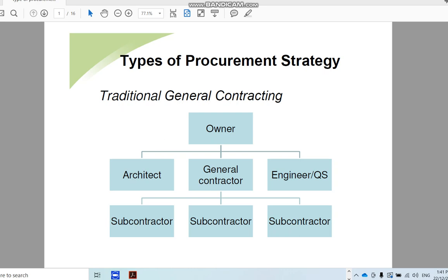So in the requirement cycle, the owners, engineers, or separate consulting engineers or the architects or professionals prepare the concept, characteristics, and nature, the environment that this project will be carried out in. Then you want to pick the right arrangements of the people who are going to be in the project to provide the service and goods in order to deliver the project at the end of the day. So the type of procurement strategy is the first thing that we need to determine, and usually that will form the very beginning. So after understanding the characteristics, the project environment, the do's and don'ts, the constraints of your project, now it's time to determine the strategies.